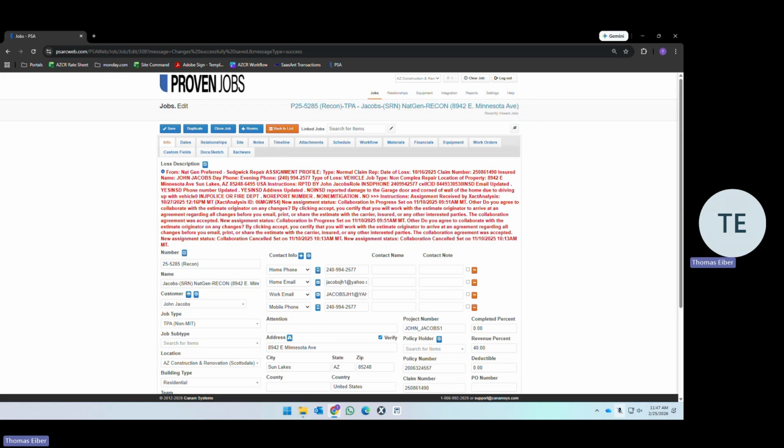Next, costs versus budget. Information that you put in about your actual costs is going to be compared to the budget, which is going to give you a gross margin. The information about your actual costs is important to be accurate because that will determine your percentage of the budget that you have spent, which will be used in your incentive structure in the future.